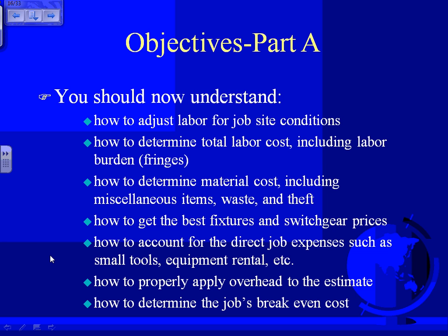Well, there's a bond that you have to keep with the state as an electrical contractor, $25,000. Every electrical contractor in Minnesota has to maintain a $25,000 bond with the state. That's to be licensed as a contractor. Then after, they don't even pay it. They buy it like insurance. The people who provide a bond provide insurance, almost.